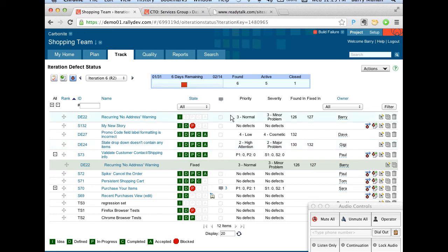So it does depend on what you do with that defect. If you estimate it and plan it into a sprint, we'll show that as a scope creep. Yeah, I wouldn't. I mean, as far as the task. Well, remember to make the distinction. If you task that defect, certainly it's going to be part of the burn down. If you don't task it but do estimate it, it will be part of the scope for that sprint. But if it's tied to a story and represents the acceptance criteria for a story in that sprint, I think it would just be wrong to give it points.